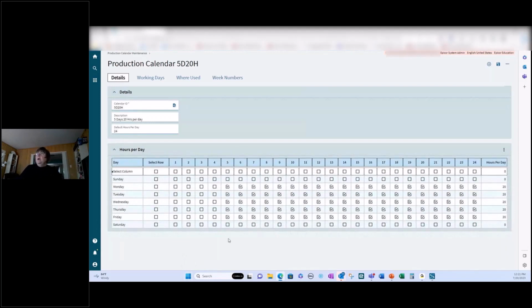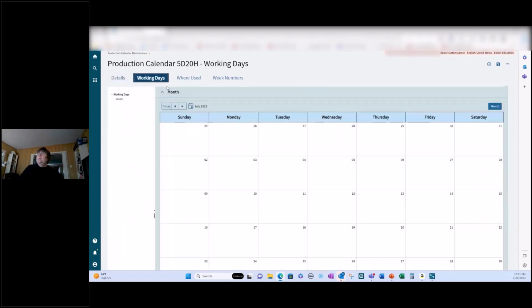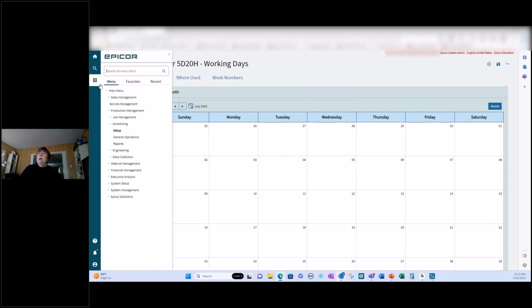So this particular operation works Monday through Friday, does not work Saturday or Sunday. So I can change my work days. If I have a holiday, for example, I may want to put in the 4th of July holiday in the schedule so that my employees are not working that particular day.